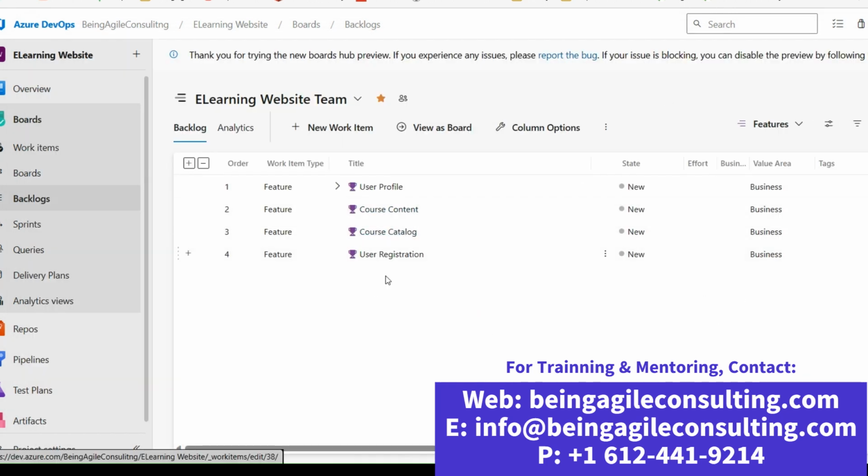So now that you all know how to set the dates, let me also say this: these dates that I'm putting in there, it's not just some fiction. It's recommended that these dates should come from an empirical place, which means that the team should be the one giving the estimated date based on their history, based on the work they've done before, based on their estimates. You see, they will be the ones to give this information, not some leadership sitting somewhere and putting this information on their own without knowing the reality of the team.